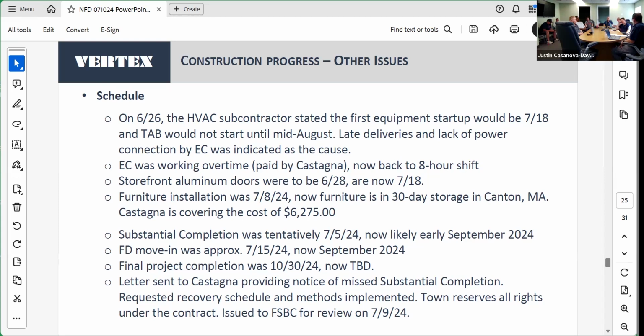Yeah, because I think you told me that when we spoke last week. But just looking at Vertex's invoices each month, if you're just taking it divided by 30 days, now, I know there are other things, like testing agencies and things in there, it's fairly close to that $2,000 per day, so it doesn't leave a lot for Doran Whittier. Now, I don't mean to minimize their presence if this thing goes long, but are they just attending a meeting a week, or is there more? I'm just trying to get a handle on that.